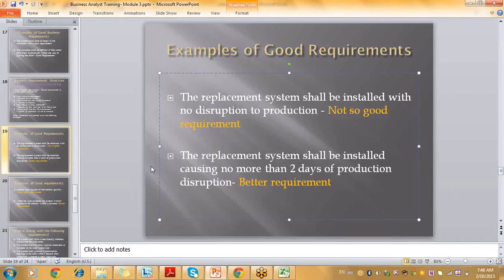Yeah, you have to ask them, saying, hey, this is my requirement, we need to replace the system. How much do you think it might take? In case of a system, I can go to the engineer and say, hey, how much time will it take? He might say there will be downtime of 1 day, but when I am going to the client, I will take 1 day buffer in case, you don't know, right? In case it might extend for more than one day. So we'll say no more than 2 days, keeping 1 extra day as buffer time. Okay. You add in the buffer day.